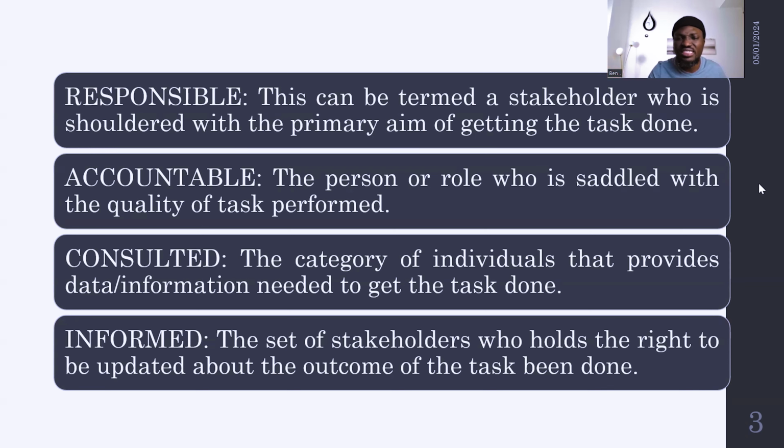For example, the solution designer or the architect on the project. The architect wants to have a hold of the document that you have been able to put together in order to proceed with coming up with their prototype or what have you. So in order for them to kickstart their own session, they need to be informed that the document is now ready. Not only do you just inform them, you even make the document available to them. And that is where they sit. Whoever relies on the outcome of the task, to a large extent, needs to be informed.